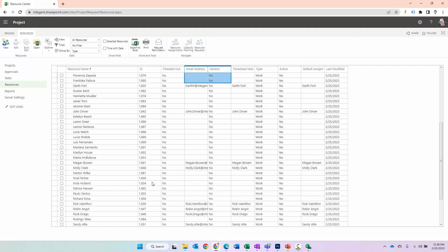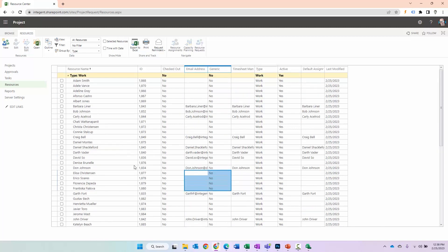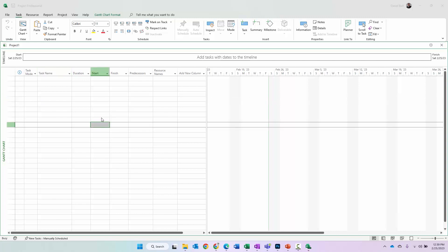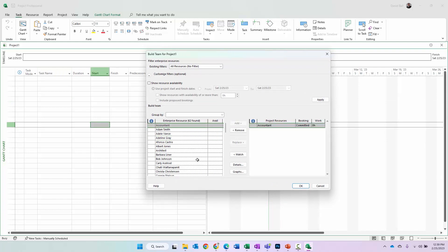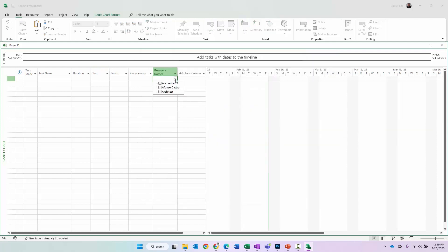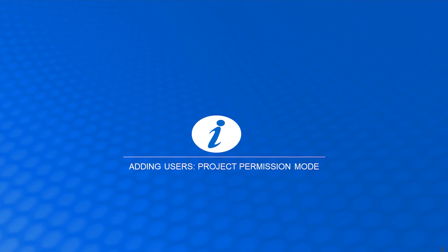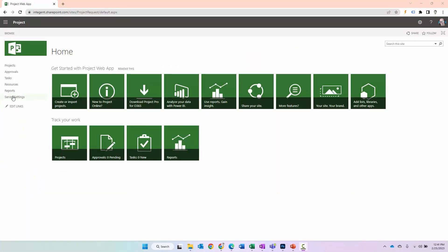Some are actual resources who can log in and perhaps enter time against time sheets. Others are just there for the purpose of forecasting their work, maybe entering their time through some other mechanism within the system. That's basically adding resources multiple ways in SharePoint permission mode. Next, we're going to focus on adding resources in Project permission mode. If you recall, we talked about permission modes in an earlier video. The big difference: clicking on Server Settings or going to the gear and clicking on PWA Settings — same end result. You're going to have that security grouping section in Server Settings, which you won't have in SharePoint permission mode.